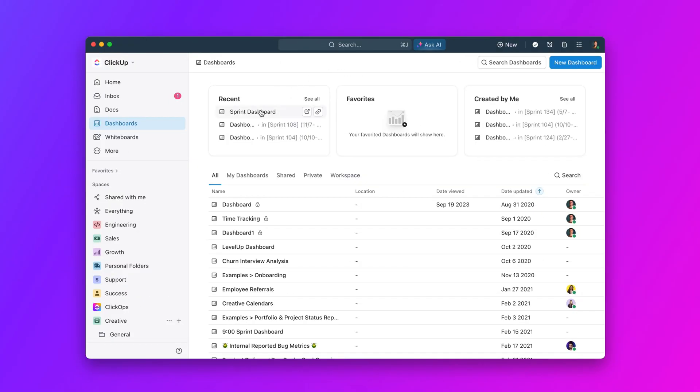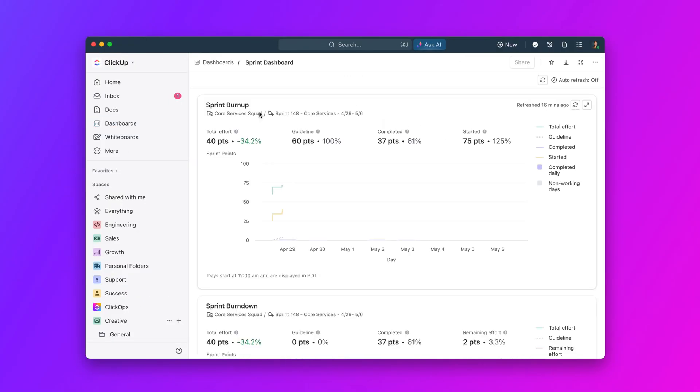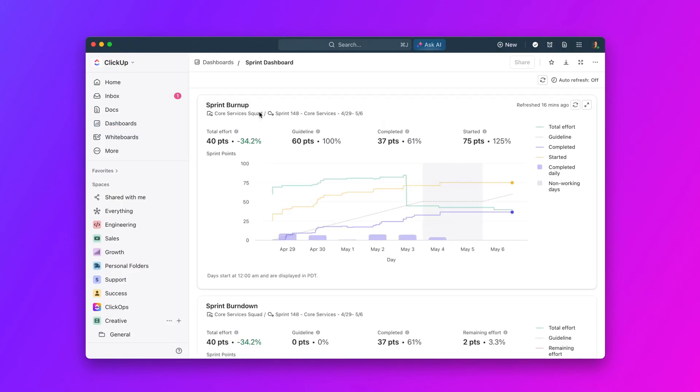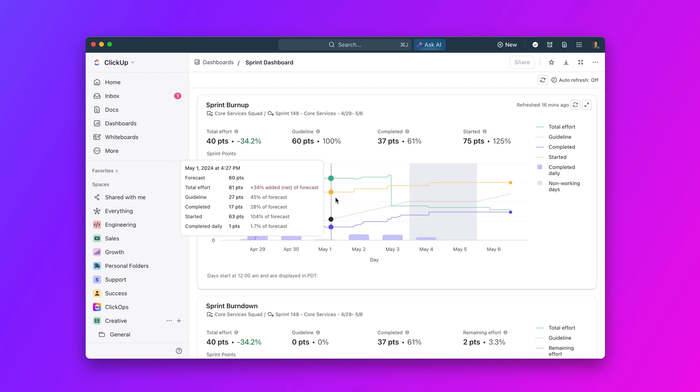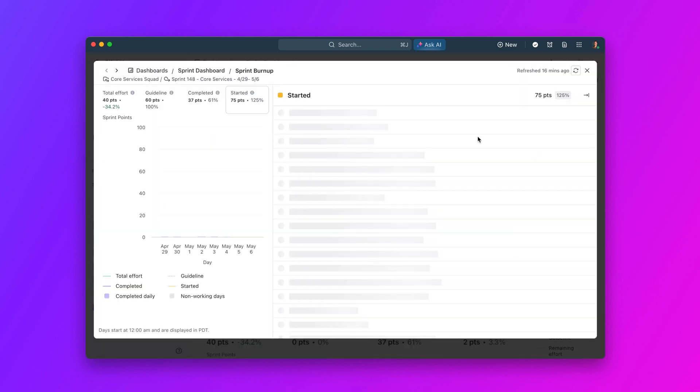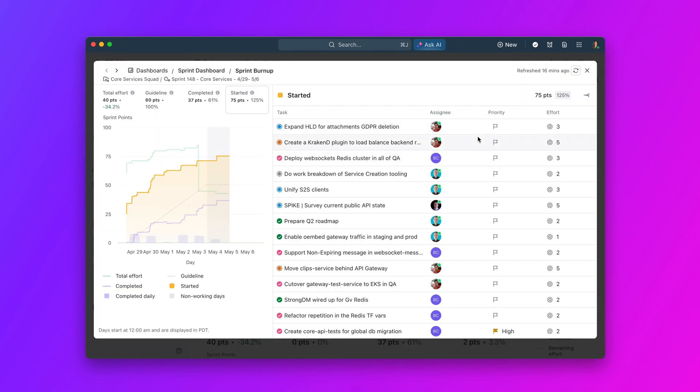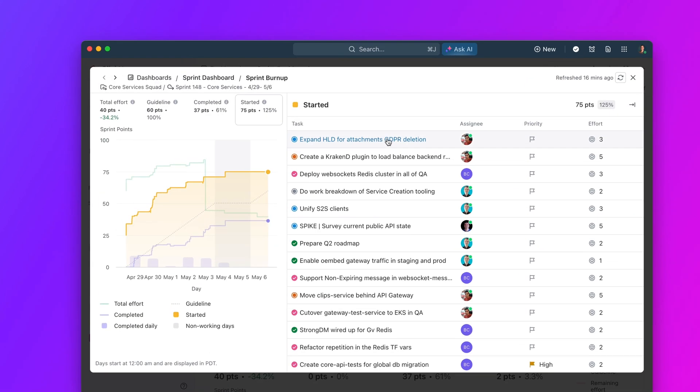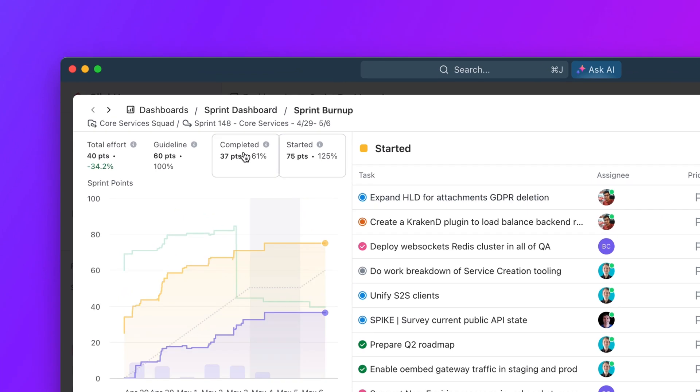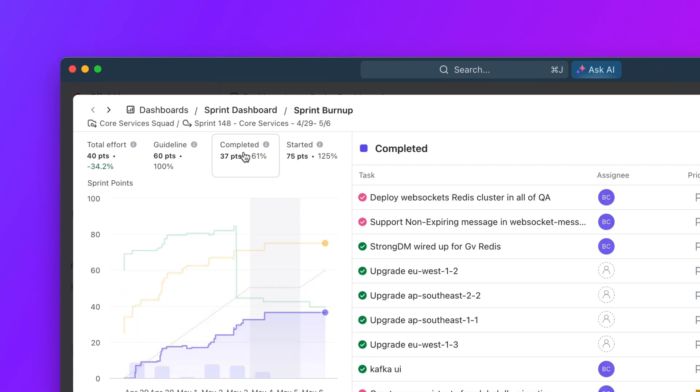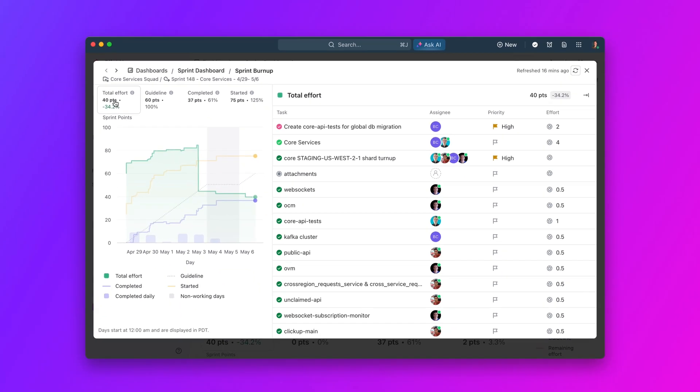Moving on, you can now drill down into sprint cards. Now, you can click into any burndown, burnup, and velocity card to view the details behind your sprint reports. See tasks that have been forecasted, started, and completed, as well as the total and remaining effort for each sprint.